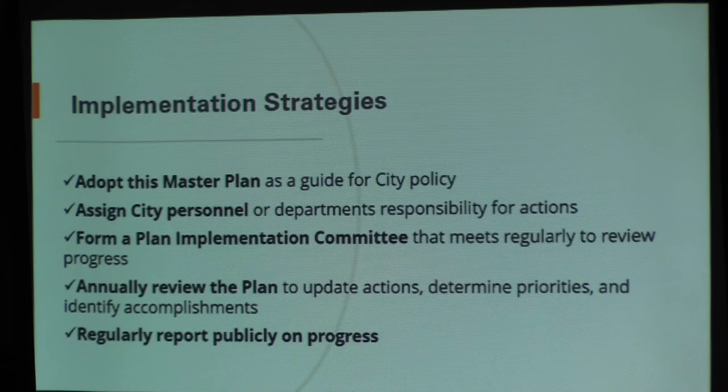Assign city personnel departments responsibility for action. So if somebody's responsible for something, they're more likely to get it accomplished. So if people know that, hey, this is what we would like you to accomplish, they can go do it. Form a plan implementation committee that meets regularly to review the progress.